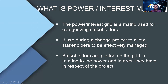We can use the Power Interest Matrix to categorize stakeholders. The power interest grid is a matrix used for categorizing stakeholders. It is used during a change project — though other project types can use it too, it gives more accurate results in a change project. Stakeholders are plotted in the grid based on their power and interest in respect of the project.